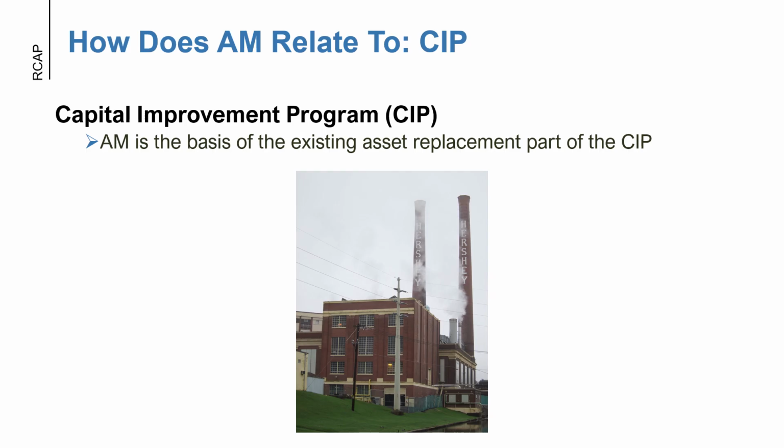So I've got an example here in Hershey, Pennsylvania, of how capital improvement plans have helped their local government obtain funding. This is for their bridge over the Southern Railroad in Dauphin County. Through capital improvement planning, the local officials in and around Hershey, Pennsylvania, identified this structurally deficient bridge's importance to the community. 12,000 vehicles per day cross that bridge, and that includes trucks that deliver precious Hershey chocolates from the factory across the railroad to America's eager hands. Local officials put together a group of stakeholders to pursue funding for the project, which included local business leaders, and after more than a decade of hard work, the group had assembled a funding package from multiple sources to make this $10 million project a reality.